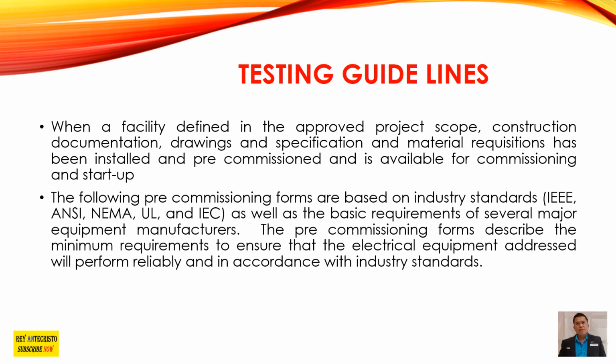And then we are also following the pre-commissioning forms, which are based on industry standards: IEEE, ANSI, NEMA, UL, and IEC. Those are the international standards, as well as the basic requirements of several major equipment manufacturers. The pre-commissioning forms describe the minimum requirements to ensure that the electrical equipment addressed will perform reliably and in